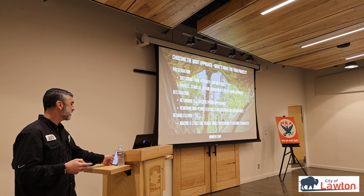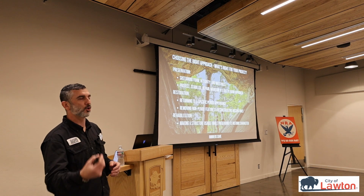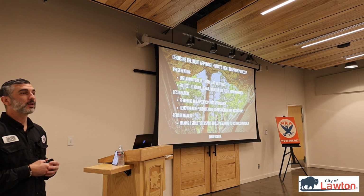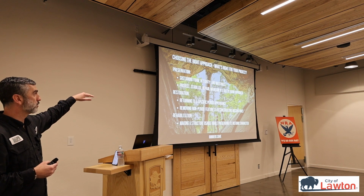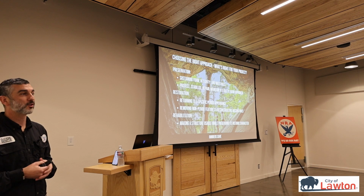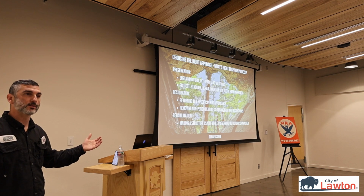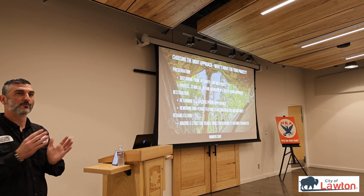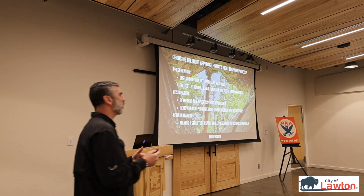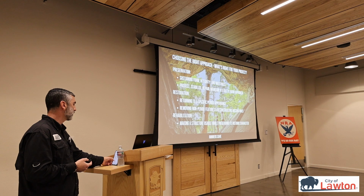And one of the other things is taking into account your procurement ordinances, bylaws, or the state statute, because if you have a preservation project, and your city ordinance says that you can direct contract for anything up to $25,000, then maybe a $100,000 project gets split up into 4 separate preservation projects. And we can work within these rules to make sure that we're really taking care of these projects.